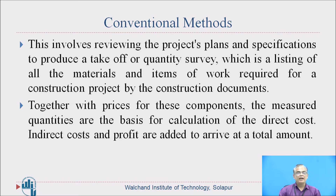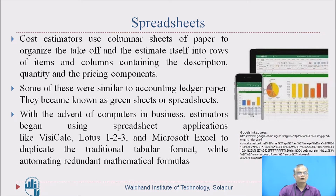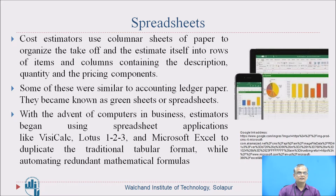Direct costs are the costs of materials and labor, and indirect costs are other costs like petty expenses, contingencies, etc. Profit will be added to these to arrive at a total amount. This was the procedure followed by contractors previously. They also used columnar sheets of paper to organize the take-off and the estimate itself into rows of items and columns containing the description, quantity, and the pricing components. Some of these were similar to accounting ledger paper and became known as green sheets or spreadsheets.